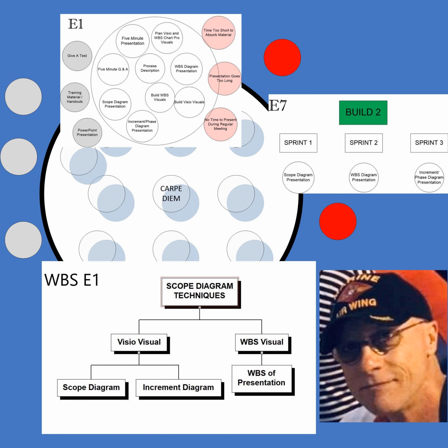Now, sometimes you'll see there are differences. Something different had to happen at X. Structured cabling complete, and you put the target date, and then when it's complete during the meeting. So you're having these meetings for 6 months, and when they complete something, you put down complete. They're on the meetings, and they're telling you, yeah, we finished that. And as time went on, obviously they were all complete as we kept going. Let's go back to X.